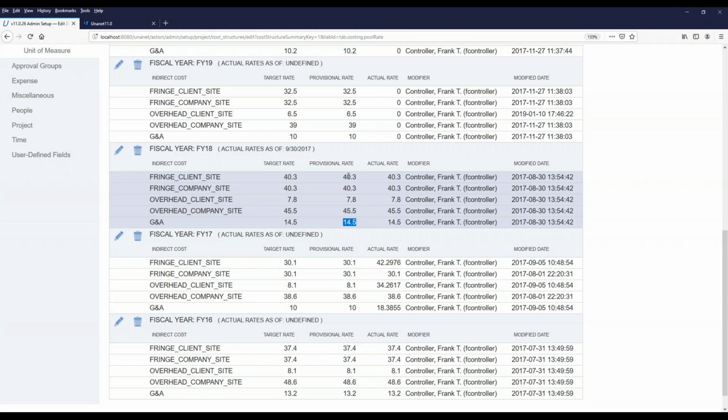Now, of course, it's not going to be loaded up on a permanent basis. It's not going to be burdened on a permanent basis for billing and such until accounting actually posts those time records, and posts those items in the expense report to the GL. At that point, the calculation and assignment of these costs will become permanent for billing and payroll purposes. But meanwhile, the system is doing this in real time for a project manager in something like